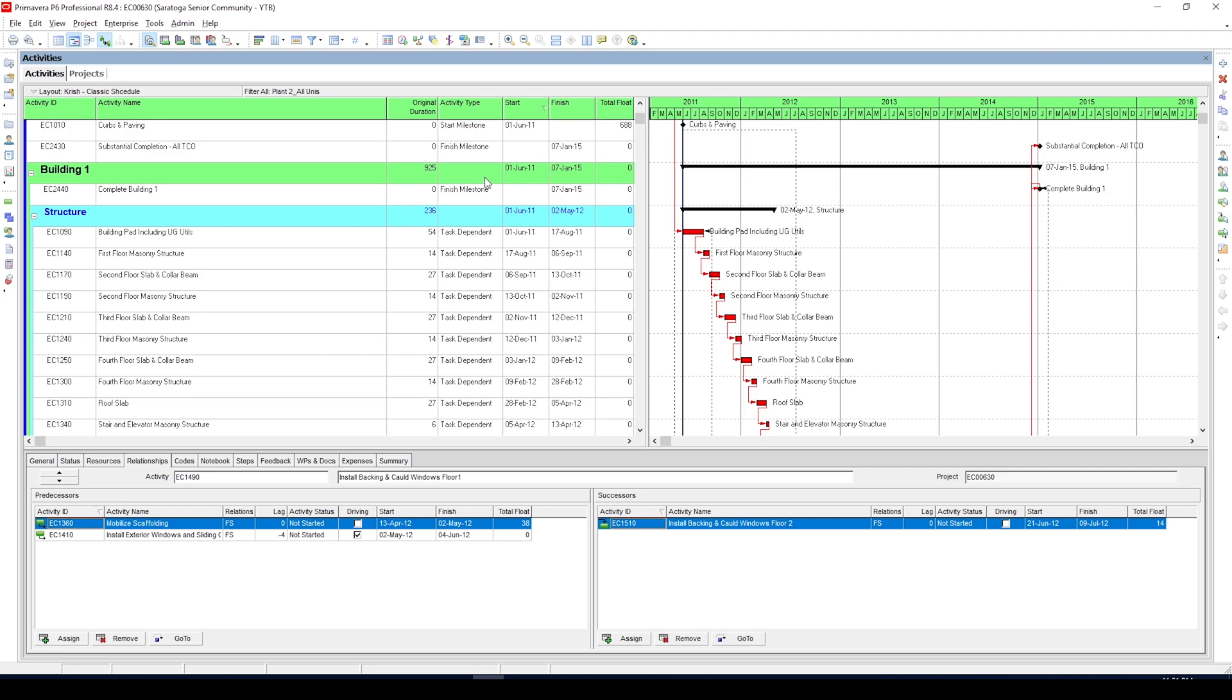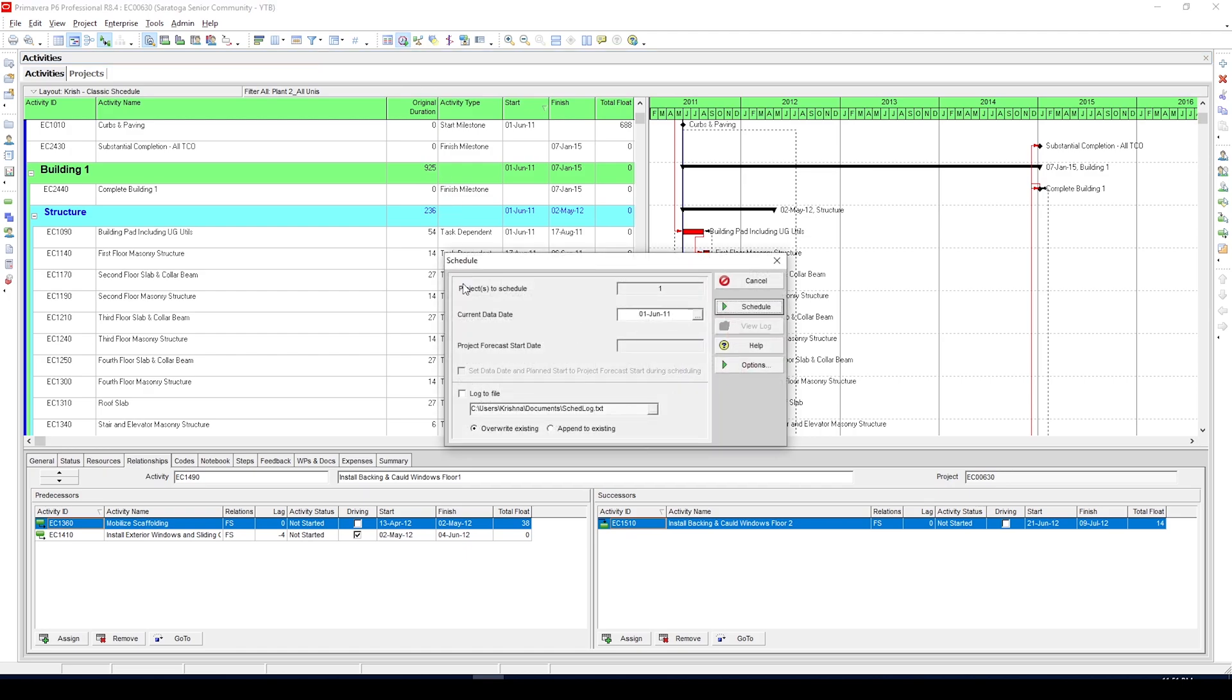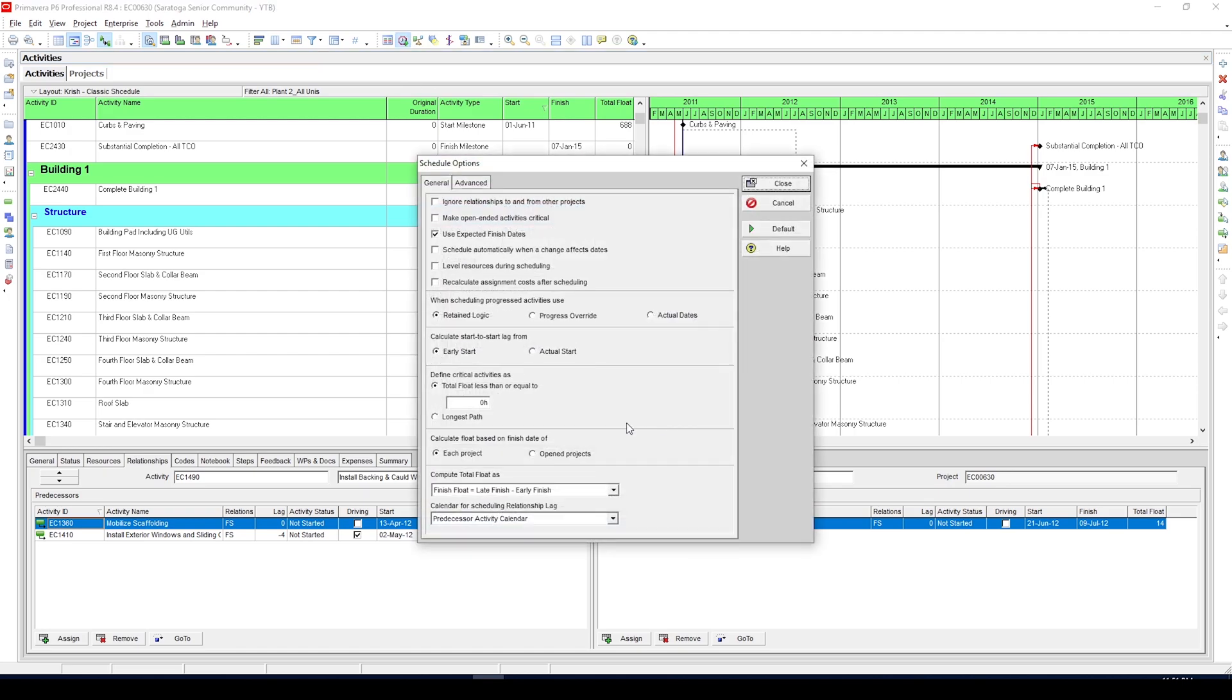To see what settings you have, click on this schedule icon and then options. I just recently installed this version and you can see I have it as total float less than or equal to zero. You can change this to a number which you want to be considered as critical for your project schedule.